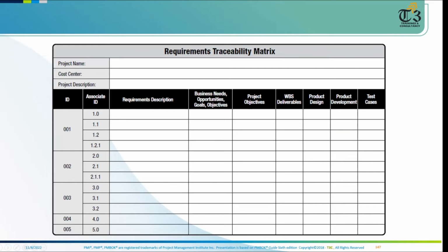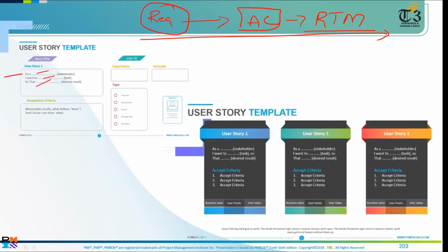Yeah. This document now? Yeah. And here we said that we will write a requirement and we will write down the test cases that in which conditions it will be approved. So acceptance criteria. Every requirement must have the acceptance criteria. Similarly, in the Agile, every user story must have the acceptance criteria. Without acceptance criteria, we will not add them in the list. Because adding something which has no value, you will add your work, nothing else. So that is what we call it, that for every user story, we will have what? Acceptance criteria, that I will verify it or validate it if I am able to do so.